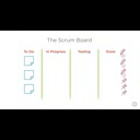I've added a column to represent each state that an item progresses through before we deliver it to the organization. The first column is To Do, which represents items that we've yet to begin. The next is In Progress, which represents items that are actively being worked on. And the next column is Testing, which of course represents items that are either waiting to be tested or are currently being tested. And the last column is Done, which represents items that we've completed.